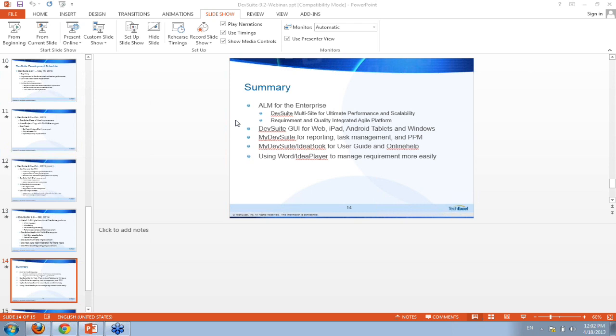Obviously, it's going to take different time remaining to finish a task. But for the points, it really should be the same points, meaning points should be used for the velocity report. It shows for each team how much work you are accomplishing each day, each sprint, in average, what the velocity rate is, while time remaining really is an indicator that helps you achieve a self-driving team with a simple number, as well as the percentage finished can be used for such a number as well.